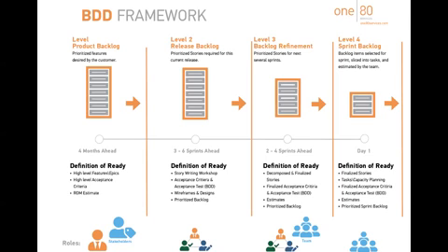And that now we're starting to break stories into stories and epics. And this organization said, in order for it to be on the release backlog, it needs to meet this definition of ready here. And then when we move it to just before we start working 2 to 4 sprints ahead, and now it's a complete user story, it needs to meet this definition of ready.